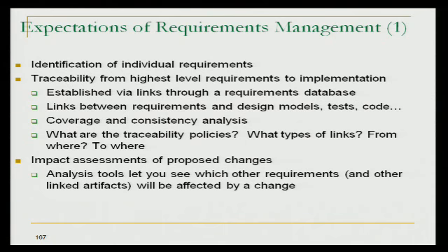And I've got to have traceability so that if that requirement changes, I can understand the impact on all these other things that are tied to it, okay? I have a whole section on traceability, so I won't talk a lot about it here, but it's a big form of requirements management. As a matter of fact, it's probably one of the biggest focus areas for requirements management. And we'll talk about policies and everything else.